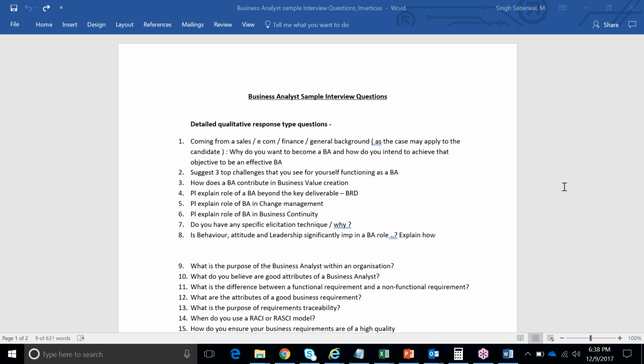Part 2, how you should and must involve them in extensive testing exercises which are being done by your testing team, so that they can witness functional testing, integration testing, and other kinds of testing, so that they are fully aware of the nuances of the business process flow at a transactional level, and are able to learn and inherit that. They can then be the right takeover points from the IT team, because after the go live the IT team will support the functionality for some time and then they will obviously go away. But a well developed user community is the next stop point which takes over this inheritance from the IT team and carries forward the success of those functionalities in the system. Hence, their enablement and training are key to the success of the project.